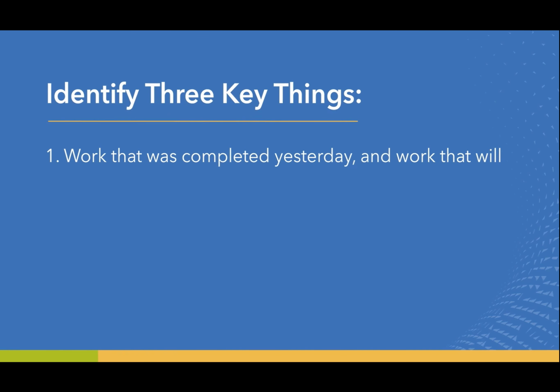When having the team update their work, remind them this is not a status meeting and ask them to keep their update to less than 60 seconds. As a Scrum Master, it's your job to help the team learn how to do this effectively and manage the team's time. If you have an update that veers off into a larger conversation, this is a good time to step in and suggest a meet-after conversation. Offer to help facilitate that conversation and write down the topic and who needs to attend so the team can move on with the updates.